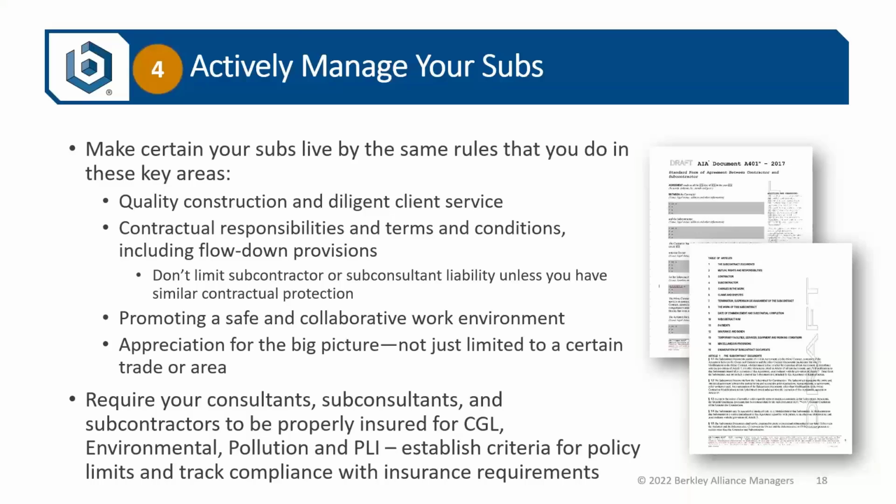I mentioned limitations of liability earlier in the program. Please do not offer those to your subcontractors or any subconsultants unless you have a similar contractual protection in your agreement with the owner. Otherwise, you may be limiting liability to a party that is truly responsible for the risk, for the claim that may come that's emanating out of that subcontracted service.